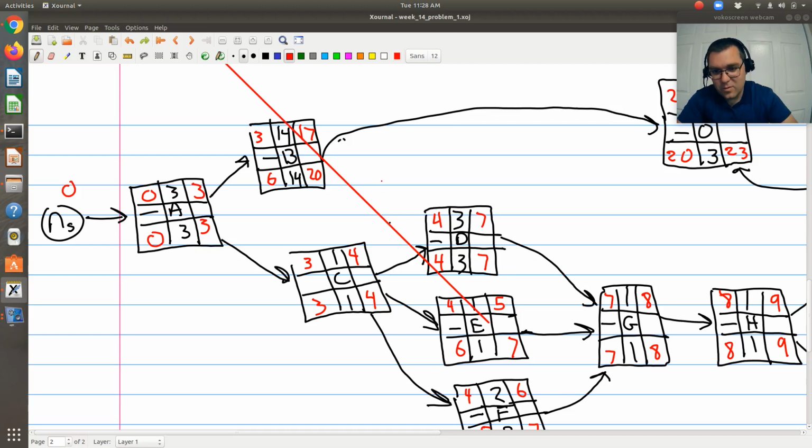All right, trying to undo. There we go, to get rid of that big line. All right, now let's go and calculate our floats, and I will star our critical activities. So looking at A, earliest possible starting time and finishing time and latest possible starting and finishing times are the same. So it means I have a float of 0. Okay, so in order for this project to begin, activity A needs to begin on time.